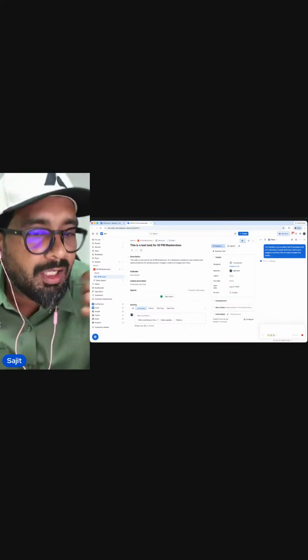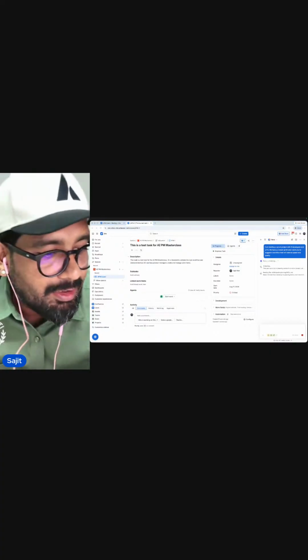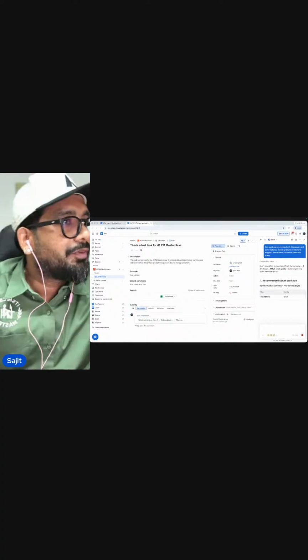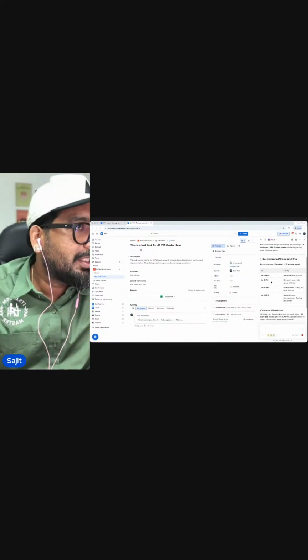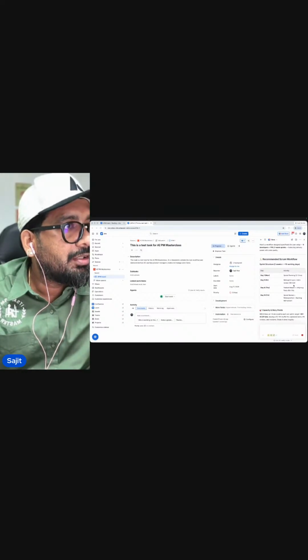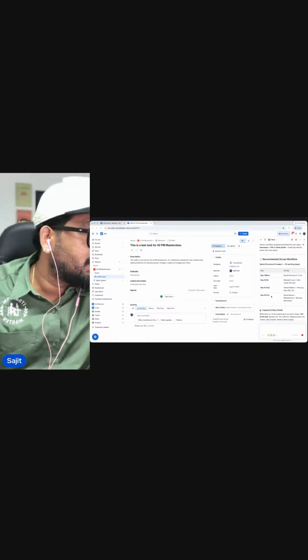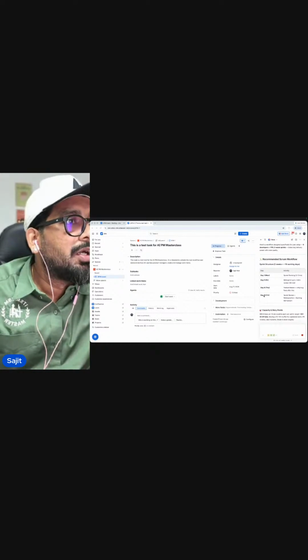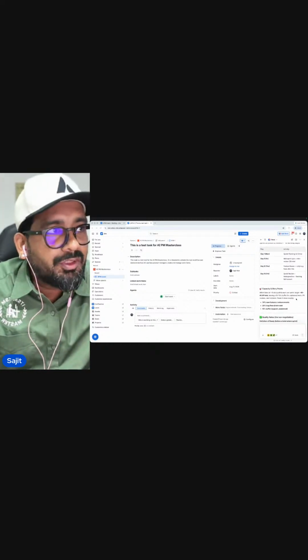Perfect. I've asked Rovo to recommend something to me. Let's see what Rovo says. All right, let's give it a minute. Okay, it's already started saying 2 weeks means 10 working days. This is how you can do it. You can do a sprint planning for 2 to 3 hours. You can have a mid sprint sync of 30 minutes on Friday. You can freeze the features. Only bug fixes should be done on day 9. That's actually smart. And day 10, Friday, you should have a sprint review, retrospective, backlog refinement for the next sprint.